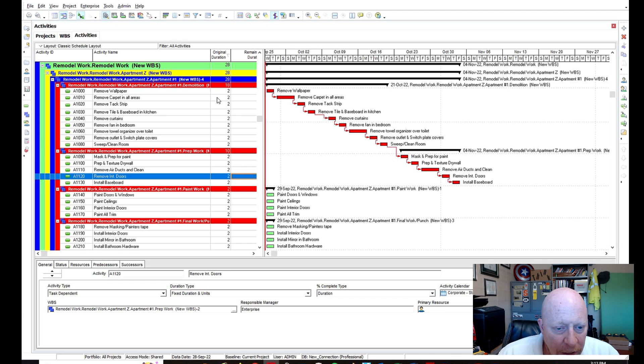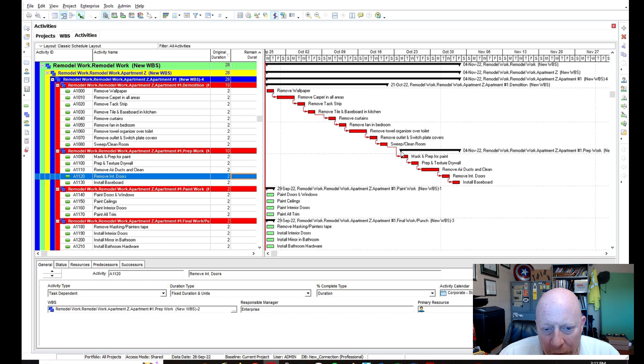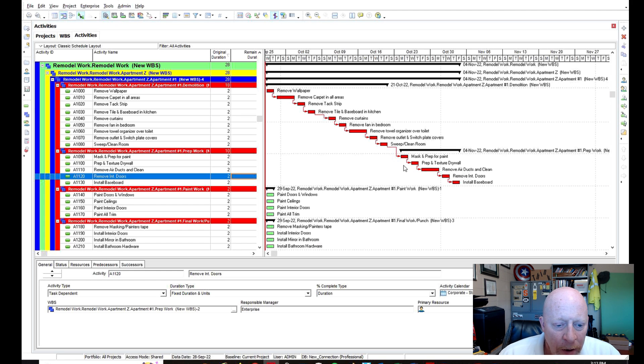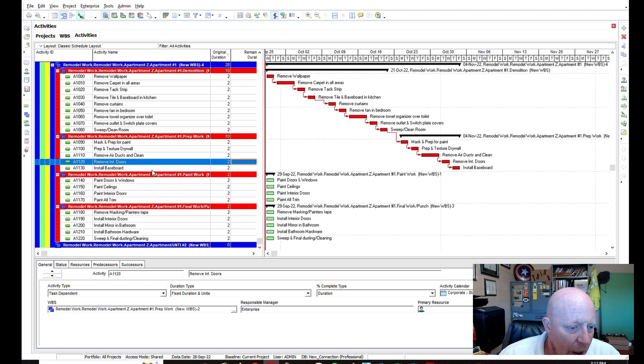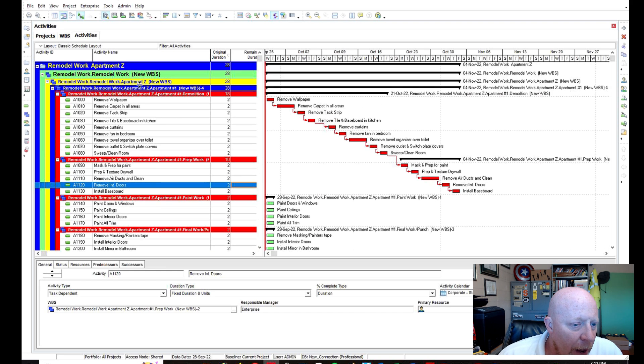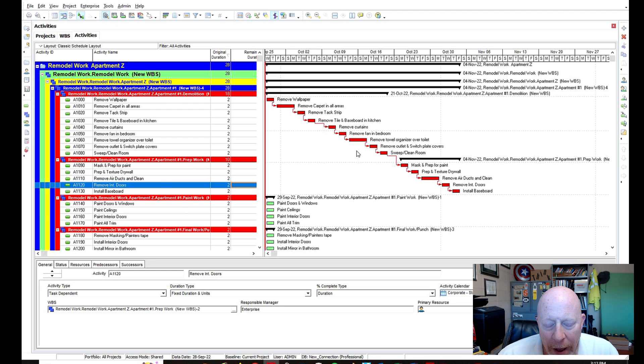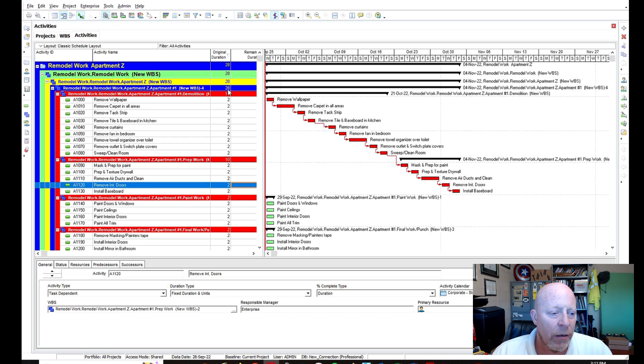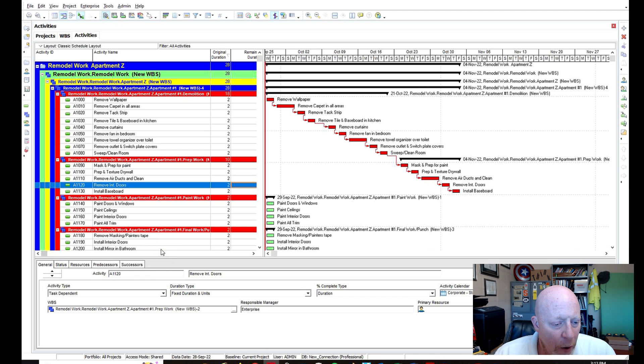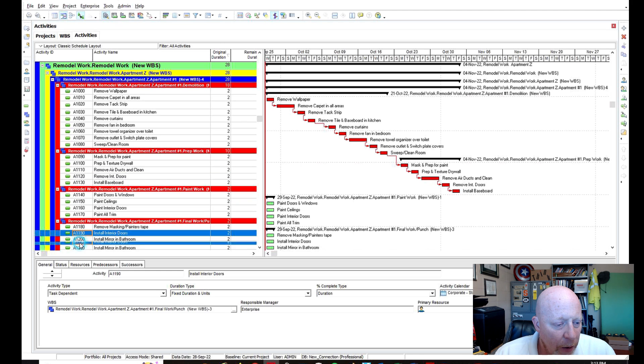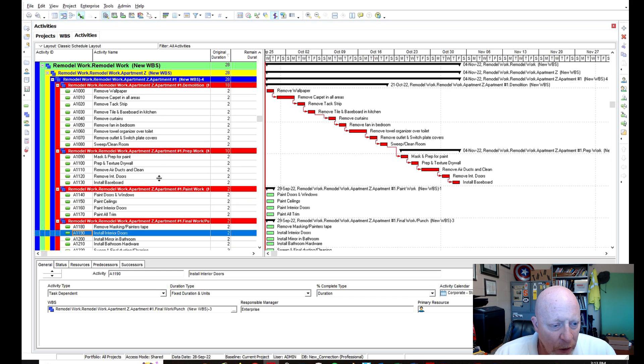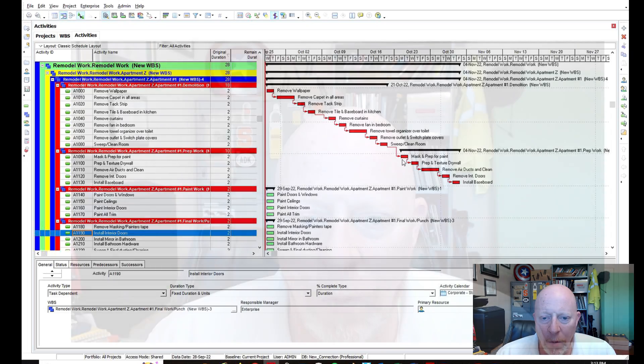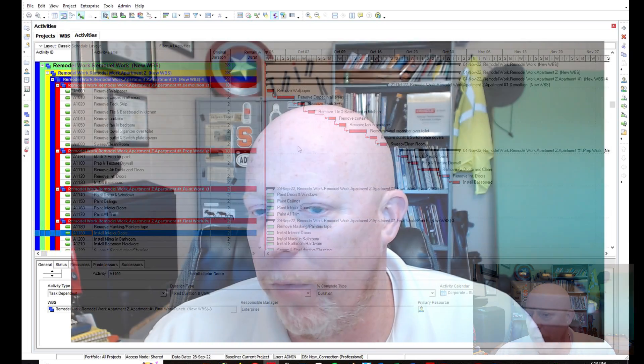Then I can click on this to here. Let me just finish this up cause it looks weird if I don't. And hit schedule again. Now that pops it out the way we want it. So as you can see, the schedule will keep flowing, but it's got these bars, the black bars in the way to separate the two so that you can tell, this is apartment number one, this is demolition. This is apartment number one, this is prep work. So you can go on down through like that. But this is just a way of using WBS to separate it. You can go in here and change the color codes. If you want to do that, you can get real fancy with it. But it just kind of shows you what's going on. And then of course at the very top underneath apartment number one, it does say the total day is 28 days. So this is just a quick way of showing you how to actually schedule something where you've got multiple lines of work in multiple units, just to help you keep track of what's going on with that. So I hope that was helpful.